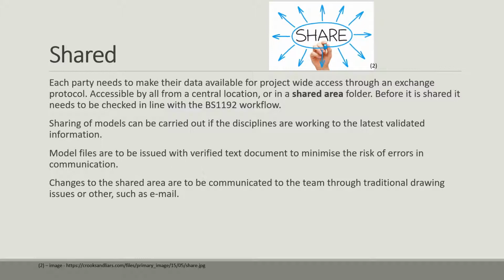The sharing of models can be carried out if the disciplines are working to the latest validation information. All model files are to be issued with a verified text document to minimize the risk of errors in communication within the project, so everyone knows what's going on the sheets. The changes to the shared area are to be communicated through the whole team through meetings or traditional drawing issues or just a simple email.